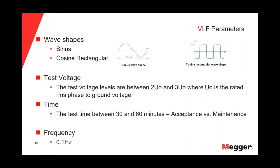To have a water tree, we need water in the insulation, electrical stress, and a lot of time. So in a new cable, we are looking mainly for workmanship issues or manufacturing defects, which we detect by means of electrical trees. Electrical trees grow very fast. For that reason, we don't need too much time — we can do a commissioning test in 30 minutes. But for a maintenance test on a cable in service for 20 years, we may have wire trees, which grow slowly, so we need to extend the test time to 60 minutes.